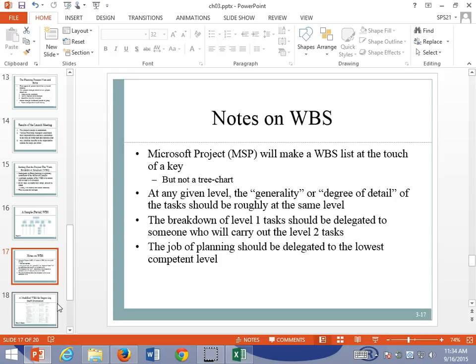Each task then has its own code. And so we start breaking them into major pieces, and then we start breaking the major pieces into more and more minor pieces, until we reach a state where each is essentially a work product. So it's something that we can wrap our head around in terms of time and schedule and resources. And so we want them in small enough pieces that we can then calculate those costs, because we filter all these down into these work costs. Then we can turn around and push that back upwards and figure out our costing.